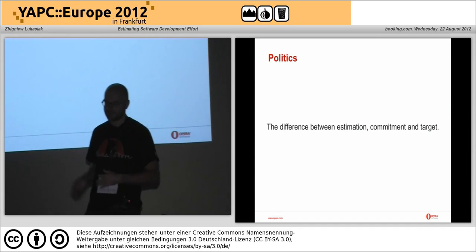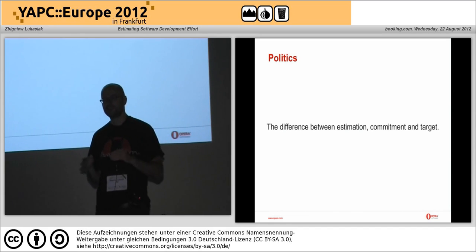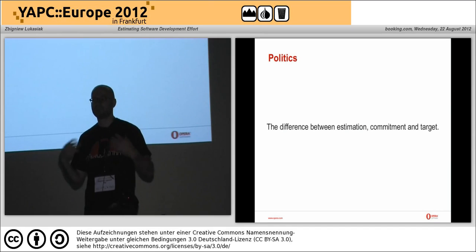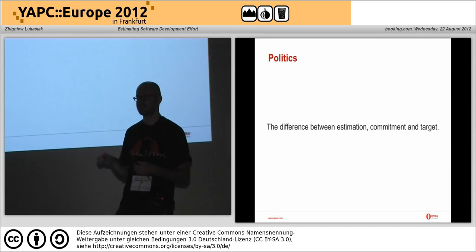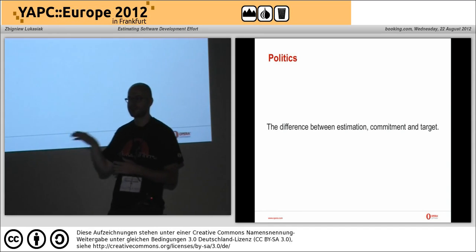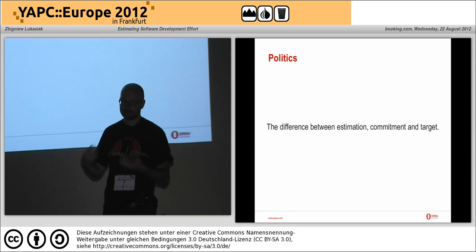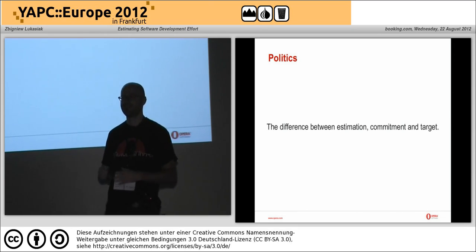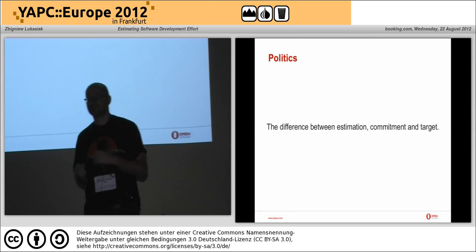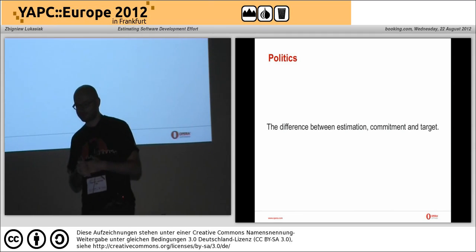Politics is very important. You need to know the difference between estimation, commitment, and target. The estimation is the objective number - how long it will take without making any changes to the project. The target is what the business wants. Your commitment is what you commit to your manager that you will do. Your commitment will usually be the target, but sometimes not.